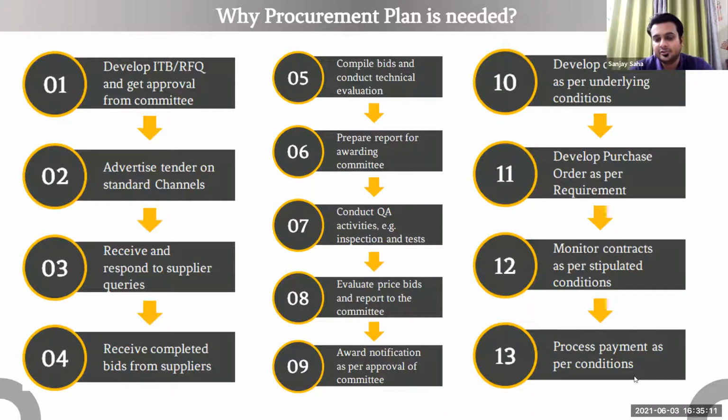Procurement in itself is a very long process, and possibly if you look at the overall supply lead time, from once you have created your supply plans to the time when the product first arrives in your warehouse or in your health center, the biggest chunk of time in that entire lead time is taken by the procurement process.